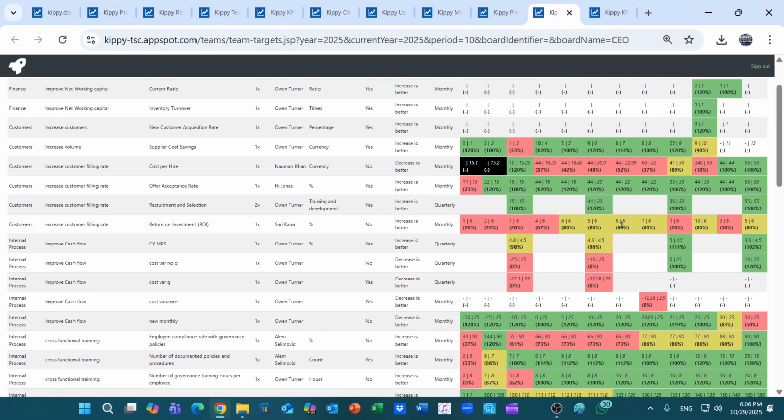percentage. Okay, some organizations will put a maximum of 120 percent. I mean, they're not allowed to perform more than this. Personally, I do not advise that. If somebody overperformed by 300%, they should take credit for this. So this is maybe why you're seeing 120 maximum here, due to this specific rule.